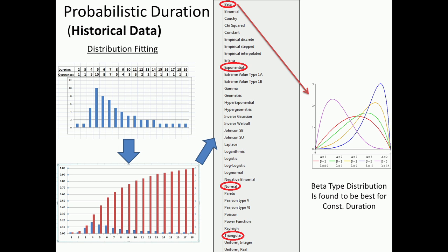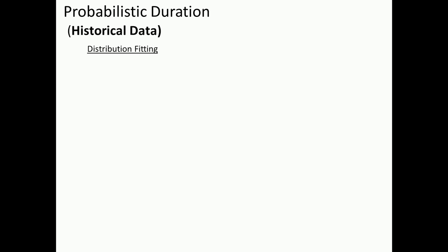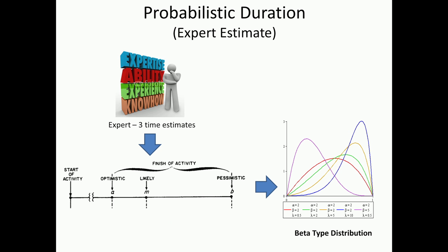Now this would be nice to be able to do, but certainly there is an overhead when we try to do it from a data perspective. So the other option is to go with an expert estimate. In this particular case, I get an expert, and I cannot get this level of data from an expert, but I will be able to at least get three times - what is an optimistic time, what is a likely time, what is a pessimistic time. And based on this, again there are several distributions - I could use a triangular distribution here too, but again what we will find is that a beta distribution has been used to model this kind of expert estimate also.